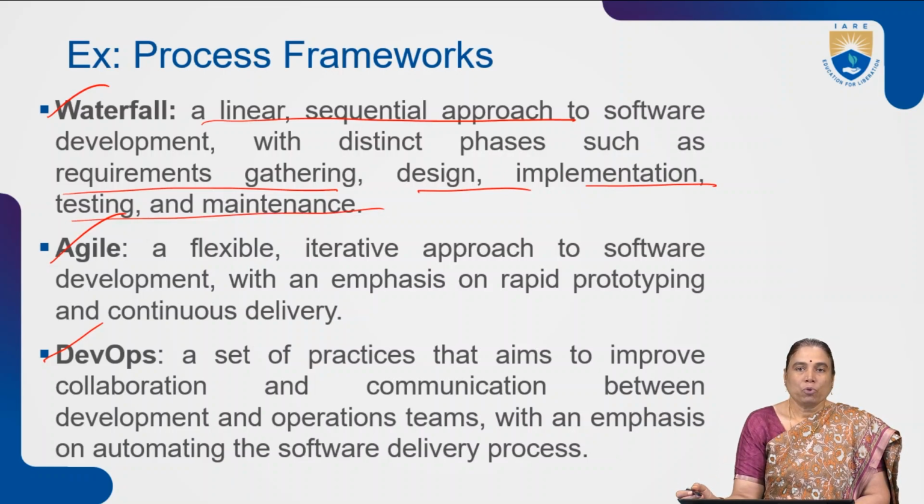It is the oldest methodology of development, where parallel activities or parallel module construction are not supported. So a change of requirement can be very difficult to accommodate in the waterfall framework.